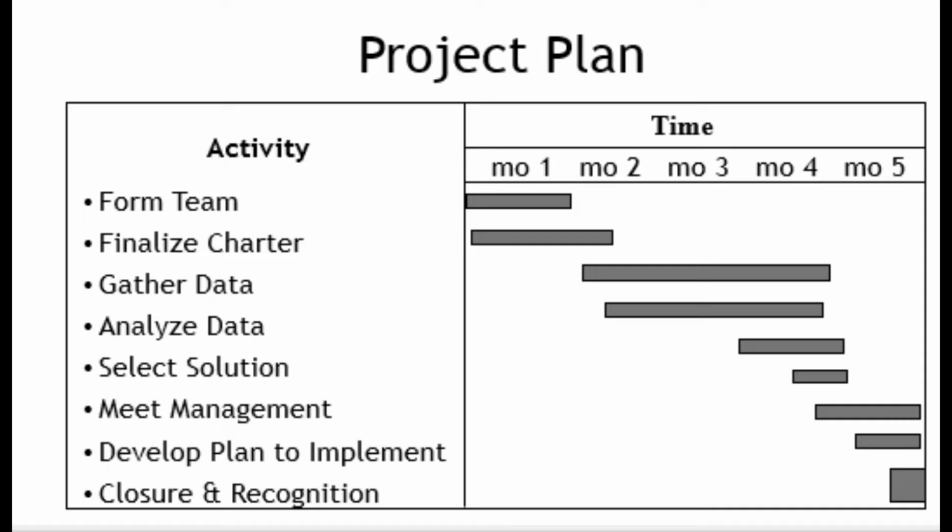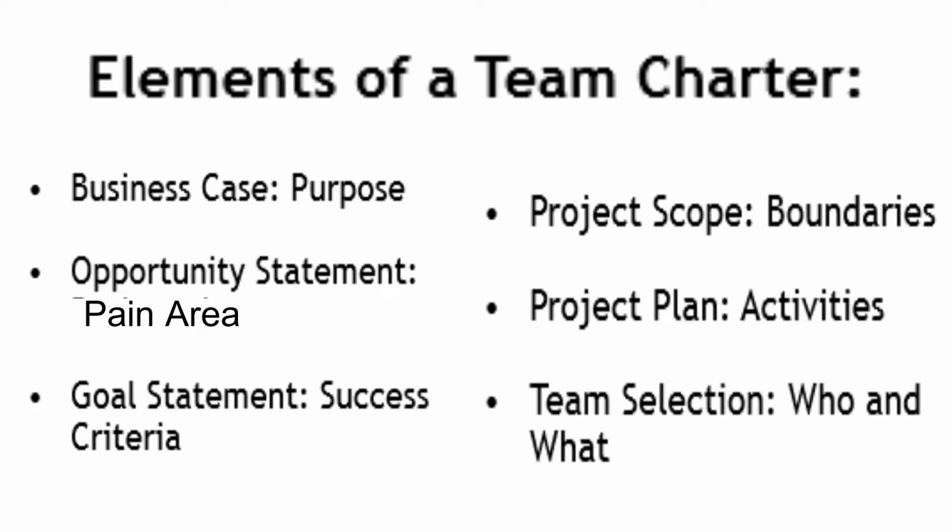But this is just an example. You can make it weekly, or some people make it daily, although that becomes quite hectic. But it is up to you, because it depends on the nature of the project and what sub processes are involved in that project. But typically from my experience, most of the time it is better to have a monthly breakup of activities as shown on the screen.